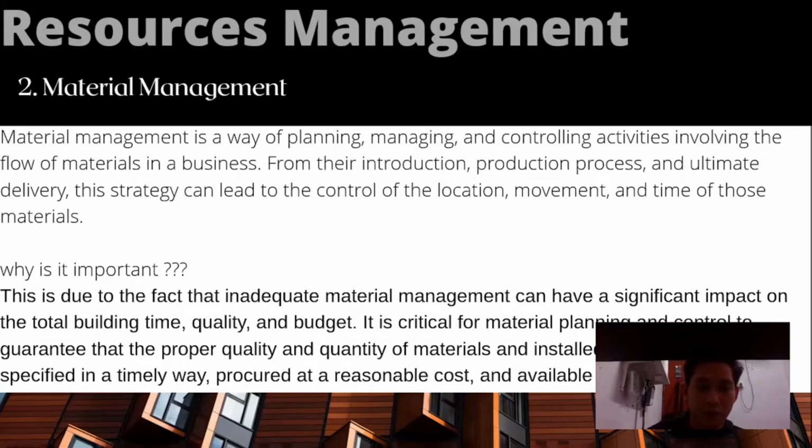Why is material management important? This is due to the fact that inadequate material management can have a significant impact on the total building time, quality, and budget. It is critical for material planning and control to guarantee that the proper quality and quantity of materials and installed equipment are specified in a timely way, procured at a reasonable cost, and available when it is required.